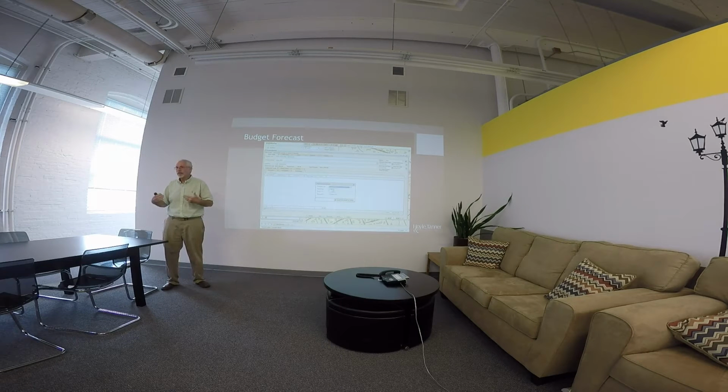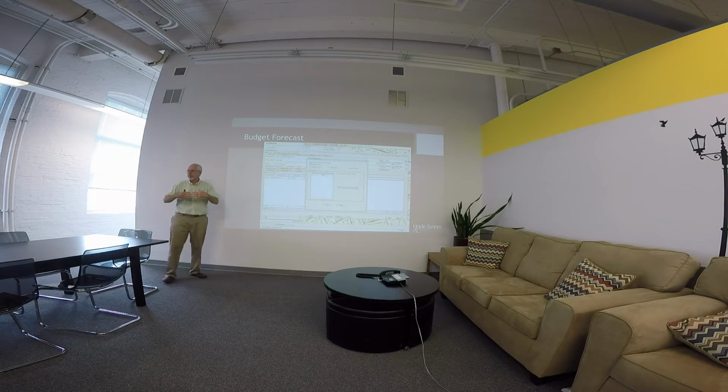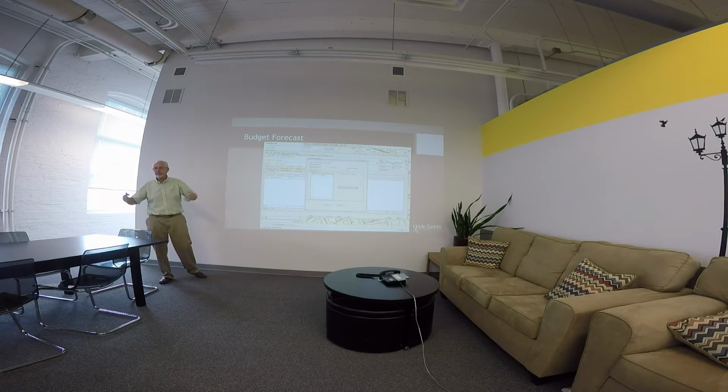So, when you do any project, what you have to do is add a percentage of the job cost. I can print this out, and you could add the pavement, including the estimated cost, measured from the road length. And if it's decided that only half the road's going to be paved, you can have it calculate that 50% of the road length and then generate that capital improvement budget.